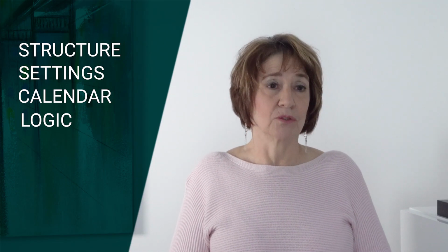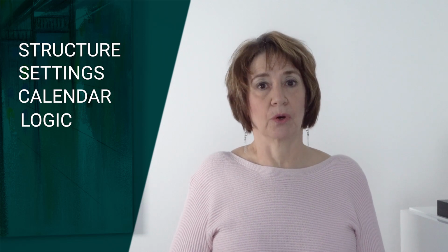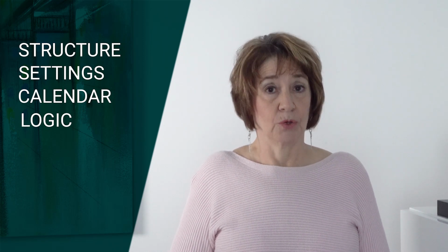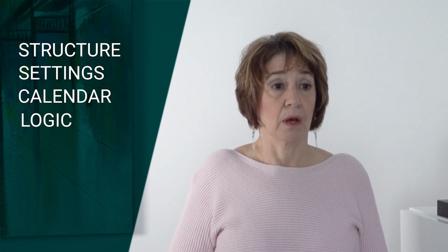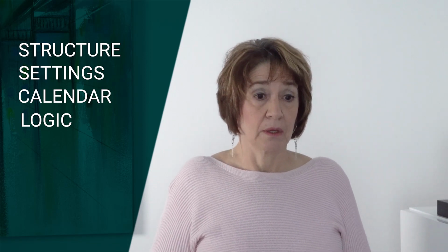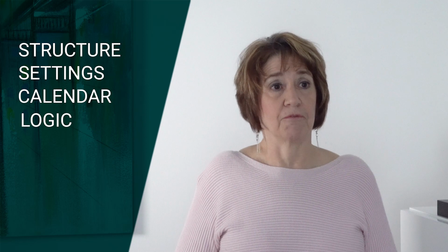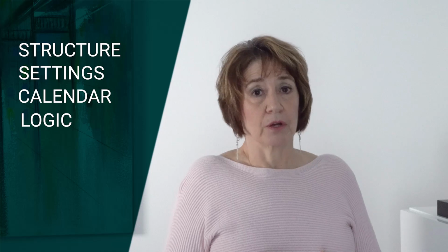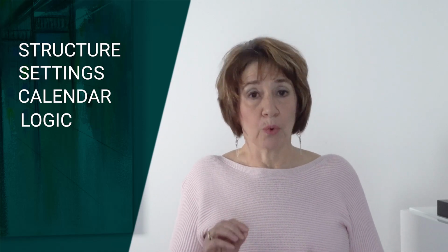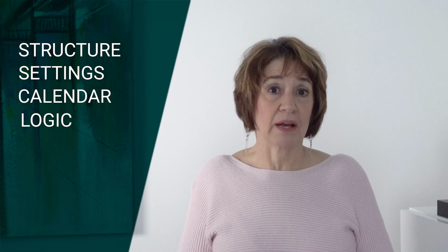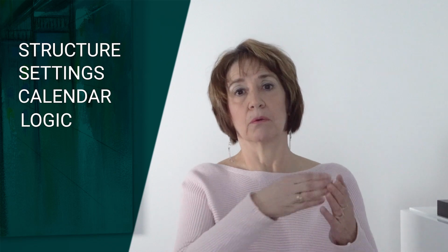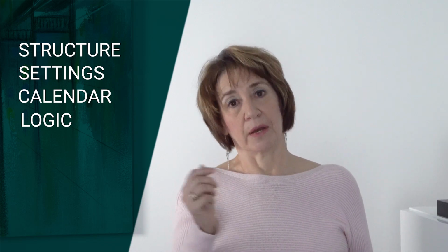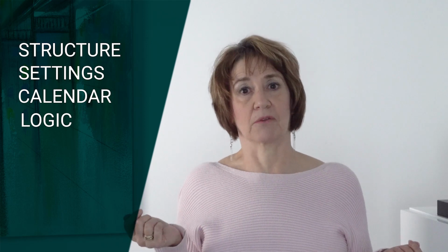And also, it's not good practice to put links on summary tasks. You can cause circular references or conflicts in the scheduling, conflicts in the logic. So it's best not to do that. If there's a clump of activities which sits under a particular summary that you know all of them linked to another activity, which would be its successor, then just do a milestone to say all these activities complete, and then link that into the successor activity.